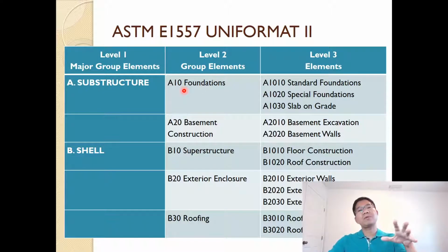and that is A10. So when people use that, ASTM stands for American Society for Testing and Materials. And A10 means foundation. In foundation, we have another level, which is level 3. It's standard foundation, something like spread footing, etc. Special foundation, deep foundation, slab on grade, basically the concrete slab on the ground.